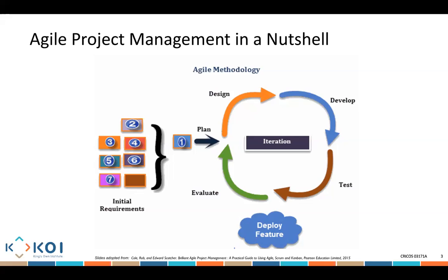That's okay, no worries. All right, guys, I said it's called a product backlog. Do you remember that term, product backlog? So it's really the product backlog. The product backlog is really about all the features of what we're trying to deliver for our system. So let's say you're going to develop a new website, and the website has 50 features. The product backlog is basically all of those features we're trying to create and set up to be able to get delivered. We haven't really delivered anything yet. We just basically created the backlog. We basically created the information about the priorities.